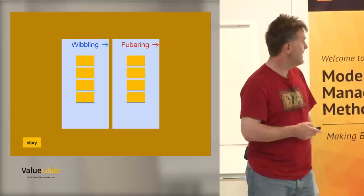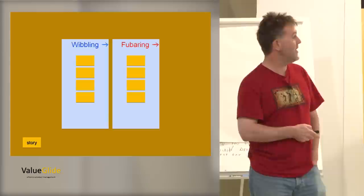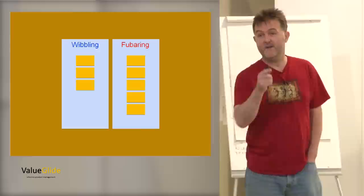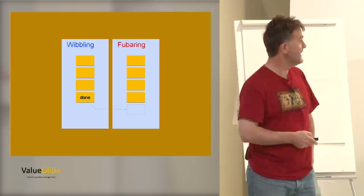So let's put up a little straw man, just so that we can immediately realize why this system here that doesn't have any work in progress limits isn't going to work. Standard setup, working left to right. When a particular story gets to done, the idea is we push it to the right-hand side, to the downstream process. Are we limiting the work in progress? And the answer is no, and that's fine because it was just a straw man.